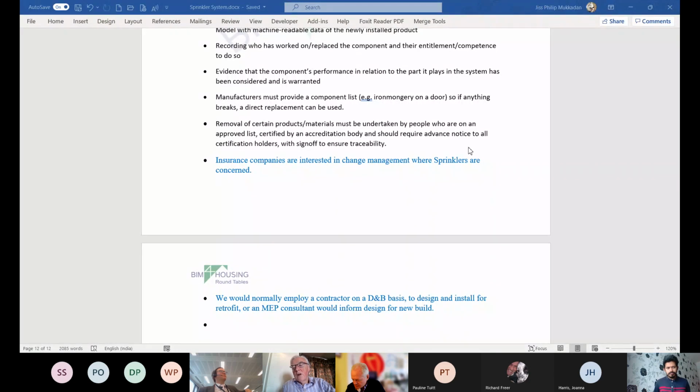So this was during the pre-construction service agreement, where they're negotiating the price. Builders tend to get appointed at the end of stage 3, beginning of stage 4, and then have a period when they're working up their final design and their final price before they actually get appointed. They don't get appointed until the end of stage 5.